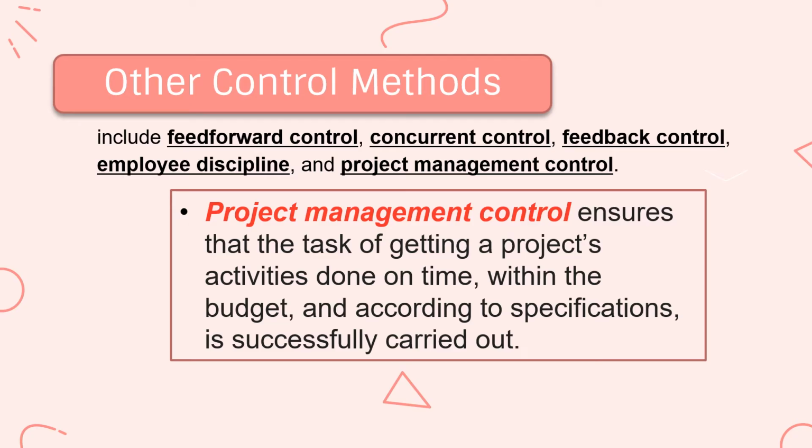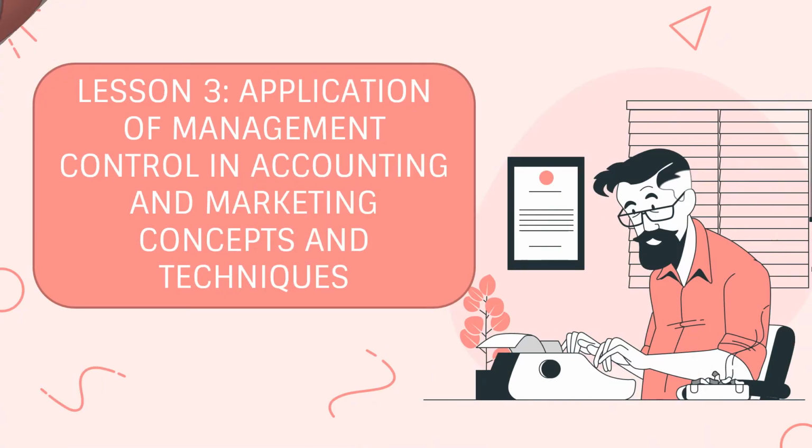So, the project planning process controls include defining the objectives, identifying activities and resources, establishing sequence and estimating time for activities, determining the project completion date, and comparing with objectives and determining additional resource requirements. So again, those are the other control methods.